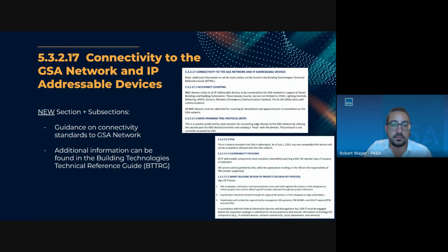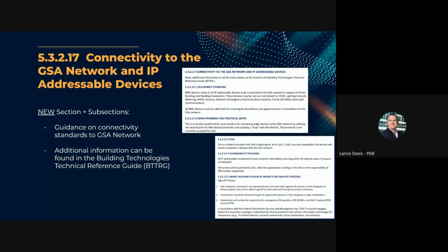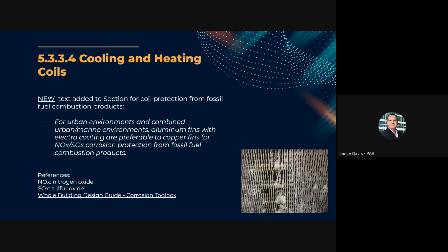Lance, you have something to add? Yeah, I'll just chime in, Greg. We also have the performance matrix that all the project managers should be using when you're setting up your project. Right now, we're in the process of updating that performance matrix, and hopefully by the end of this fiscal year, we'll have it updated for the new 2024. But then you can use that to actually go through all of the requirements as you're setting up that project and determine which ones either you or your client want to be at what levels. And that way, when it gets funded by Congress, you know exactly what's getting funded.